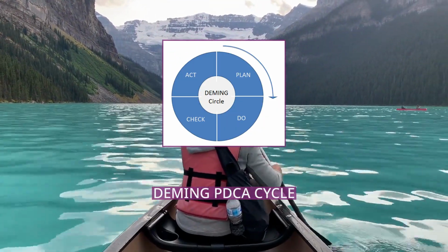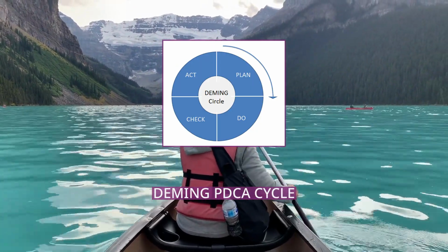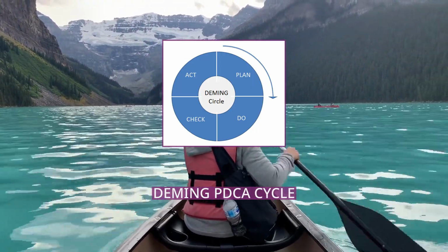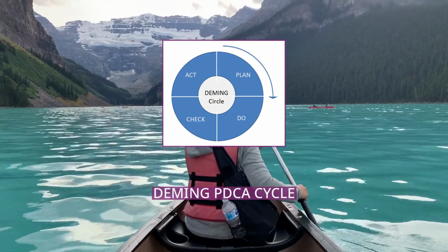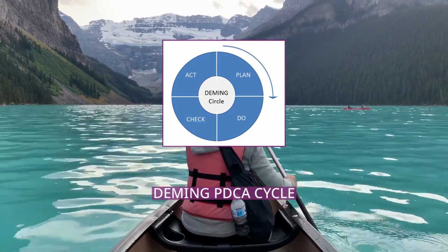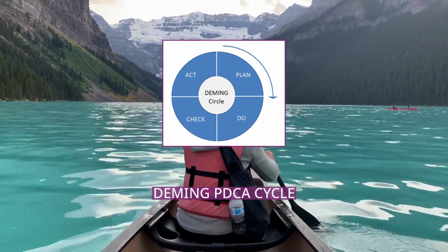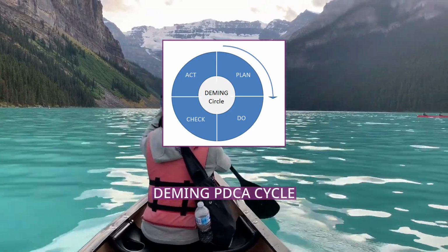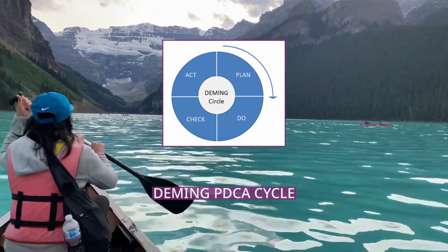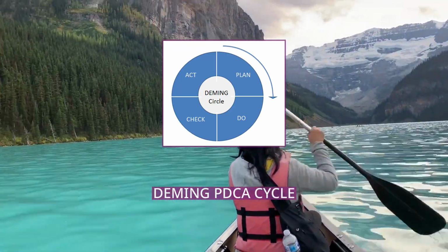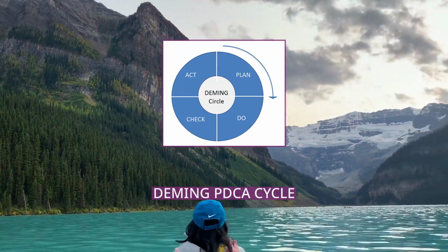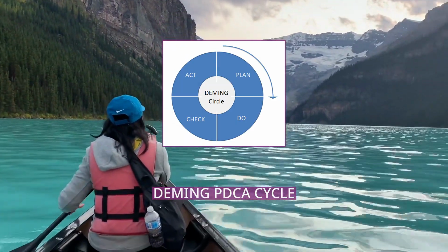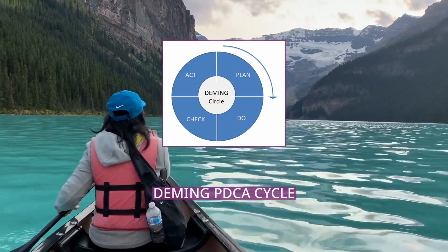During the SDM functional design phase called BD, Basic Design, design aspects were documented out of phase in detail for the later technical design, DD, Detailed Design. This caused a grey zone of responsibility to occur between the 2 phases. The functional crew responsible for the data flows and process flows in the BD were making decisions that the technical crew later needed to code, although their technical knowledge was not detailed enough to make this decision. This obviously led to problems in collaboration between project teams during both the BD and DD phases.